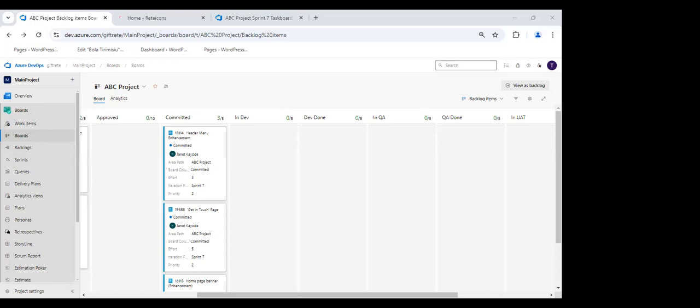You saw where Rita said, in her capacity, that she will not be available on Friday. So if somebody is not going to be available for one day, the capacity should show that that person is not going to be available. If I'm going to be available for 10 days of the sprint and somebody else is available for 7 days, you can't give us the same kind of work to do, right? You need to weigh those options. Those are all the things you saw them play out. But you might not have a full grasp of it until you start doing it yourself.